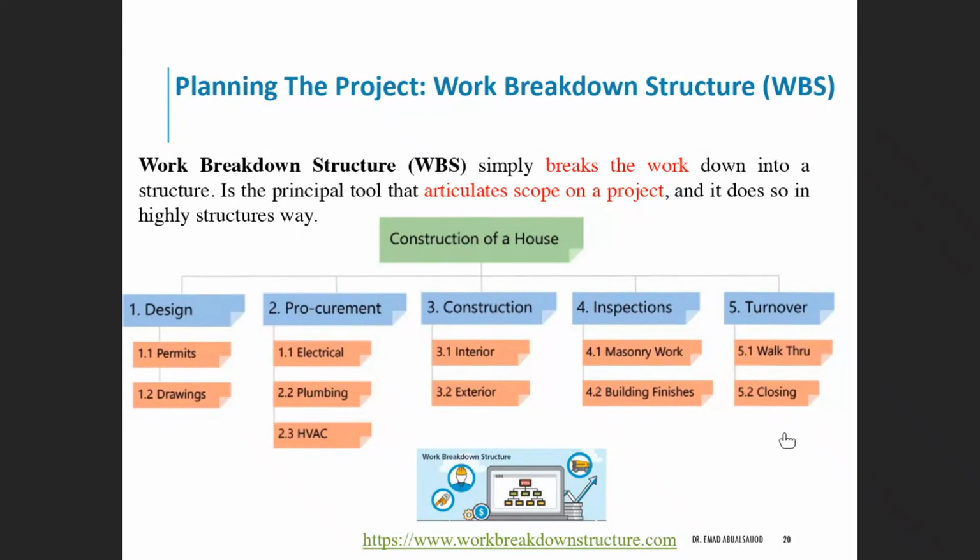So this level, this is just an example. You can have even more major levels other than those, and you can have even more sub-levels underneath each one. So you group, or what you do exactly, we number the principal activities, and then for each thing that flows from those activities, we give it a sub-numbering system.